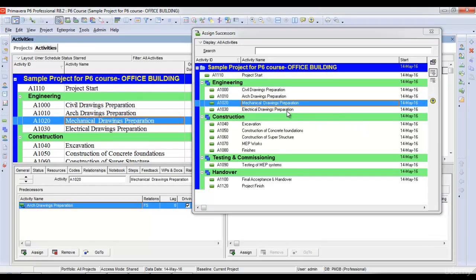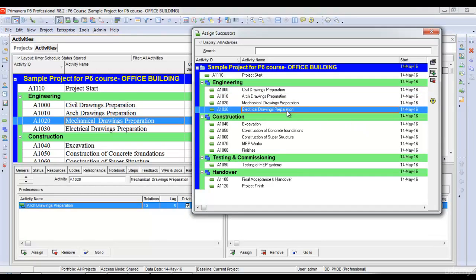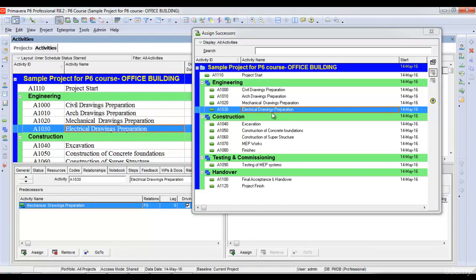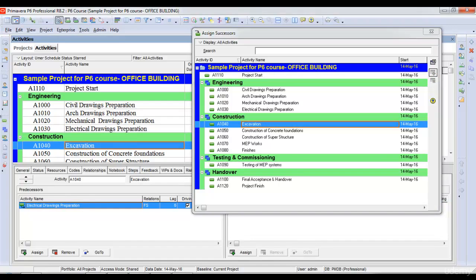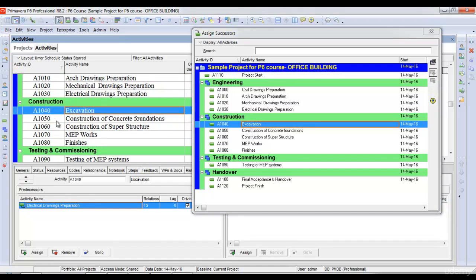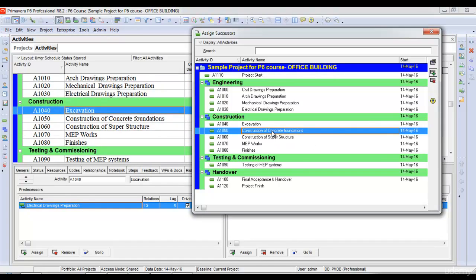For mechanical, I'll assign electrical drawings preparation. After electrical drawings preparation, we start excavation. Then I'll highlight excavation and assign concrete foundations.